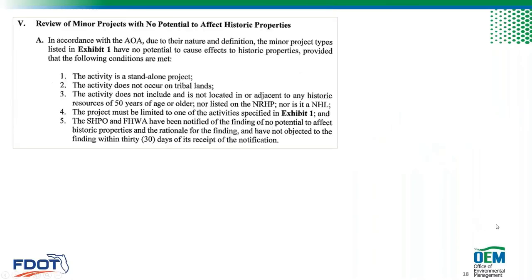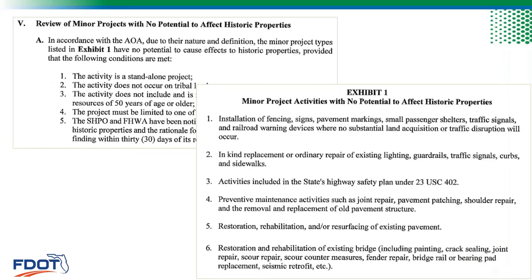Stipulation 5 of the Section 106 PA is for minor projects with no potential to affect historic properties. The conditions are: the activity is a standalone project; it does not occur on tribal lands; it does not include and is not located in or adjacent to any historic resources; the project must be limited to activities specified in Exhibit 1; and SHIPO or FDHR has been notified of the finding of no potential to affect historic properties and does not object within 30 days. The Exhibit 1 list is complete at six items — all very minor projects with no potential to affect historic properties.